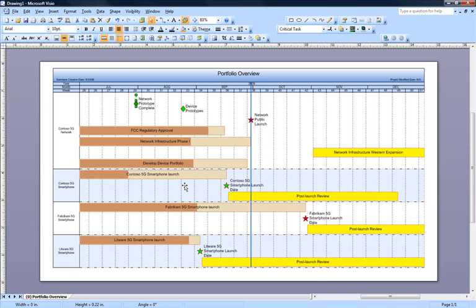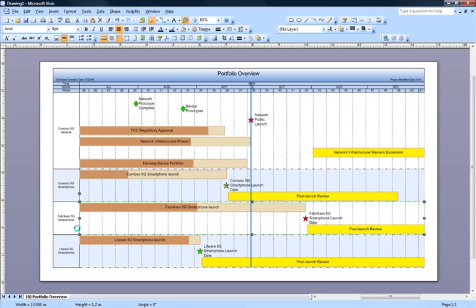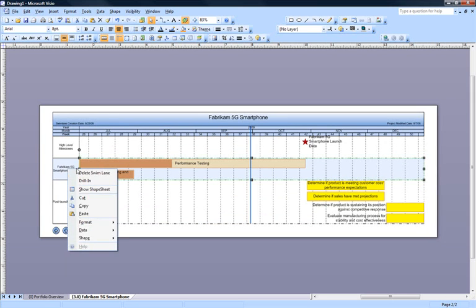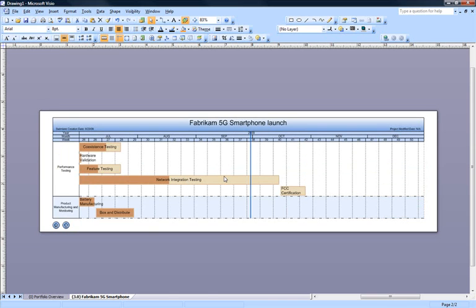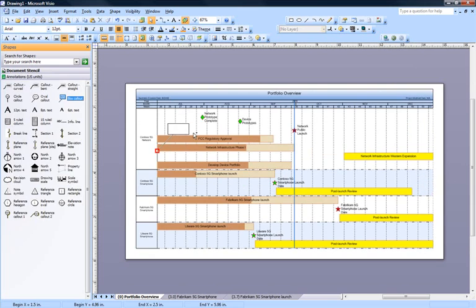All post-launch activities are in yellow, and the key milestones are stars. I can quickly see that the Fabricam smartphone is not going to be ready by the time of the network launch, so I'll drill in to the Fabricam project schedule to find out more. Looks like I'll need to drill in a bit further on the performance testing task. I'm now seeing that Fabricam is running late with their network integration testing task. I'll be in touch immediately with our contact at Fabricam to discuss this schedule issue, and I'll add a quick annotation letting my management know we're working the problem.